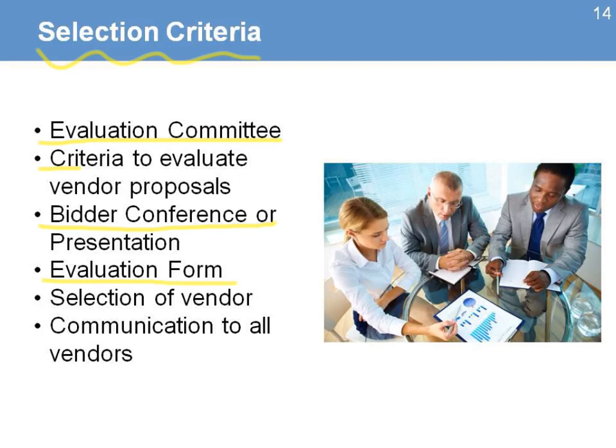You will have an evaluation form that the evaluation committee will use to rank all the proposals. You will go to the selection of the vendor based on the ranking that you get, and then a process to communicate the results to all the vendors.